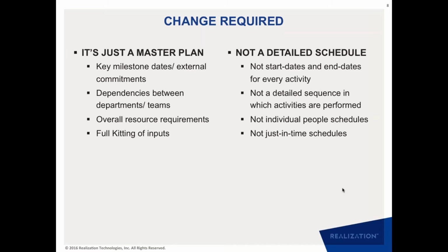The trap that we have to get out of is treating the project plan as a detailed schedule; we have to treat it as a master plan, only a master plan. What I mean by that is that a project plan is good for key milestone dates or external commitments, but it is not good for start and end dates for every activity that happens inside the project.